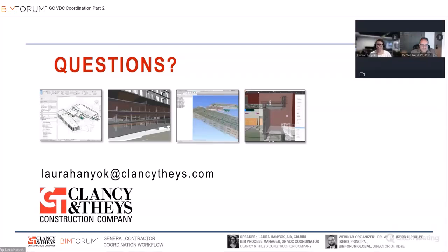We've had some case studies we've looked at where it was design build, and the trade partners, say for enclosures, were brought on early in design assist. They finished shop drawings 2 weeks before permit drawings were complete, and the architects used the fabrication model for their elevations.